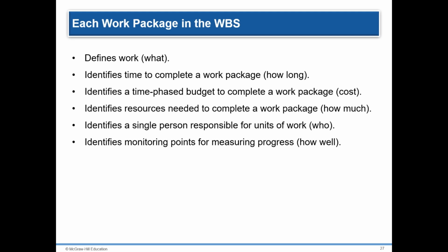There is an important difference between the work breakdown sub-deliverables and the work package. Typically, a work breakdown sub-deliverable includes the outcomes of more than one work package from perhaps 2 or 3 departments. Therefore, the sub-deliverables do not have a duration of their own and do not consume resources or cost money directly.